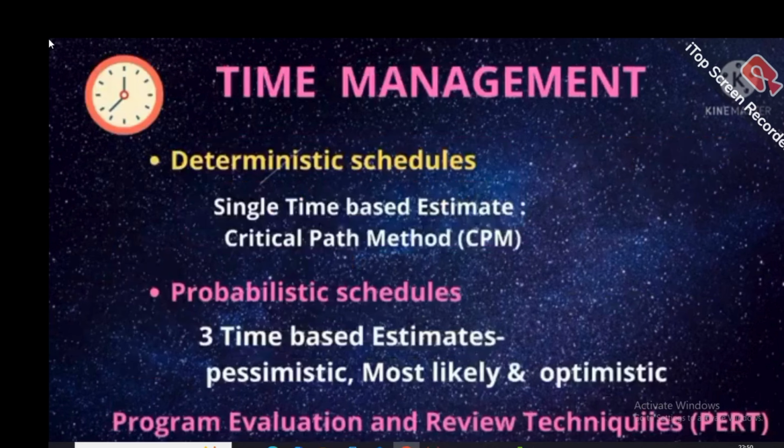My dear friend, now many people are asking why Onpassive is not giving exact dates. See, in project management there are two models. One is deterministic and one is probabilistic, and schedules are made accordingly. Deterministic schedules are for a known project with a known time frame, where there is a single time based estimate, and project progress is controlled by the critical path method, CPM. The other one is probabilistic schedules, which have 3 time based estimates: pessimistic, most likely, and optimistic. Based on that, the estimated time is calculated, and there is a probability because the outcome is not known.